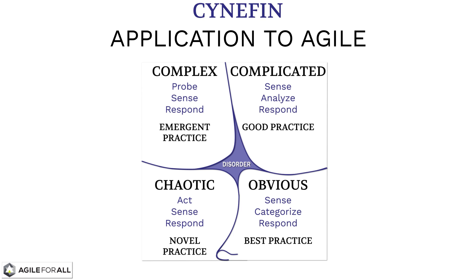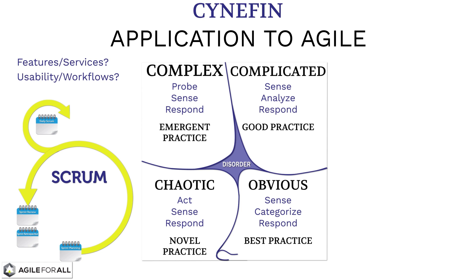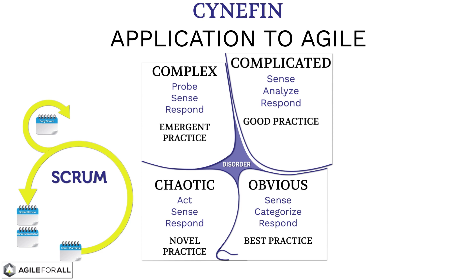Agile frameworks are designed to function along the boundary of complex and complicated. Let's take a simple Scrum product development example. Product development is an inherently complex type of problem, since we can't accurately predict exactly which features and services a customer might want, how they might use them together in various workflows, and exactly what technological approaches might best deliver those solutions. For many years, most organizations have treated this problem as if it is complicated, devoting more and more time and expertise to analyzing the problems up front. Since they are using the wrong domain to solve this problem, the results don't get better with more analysis.